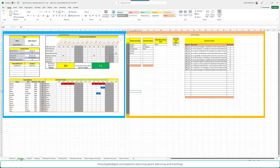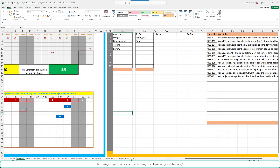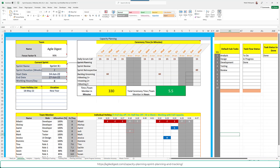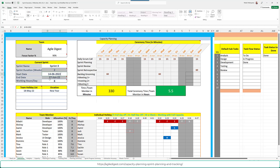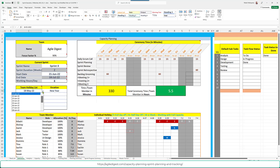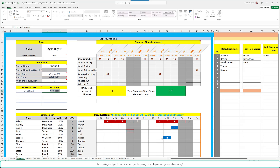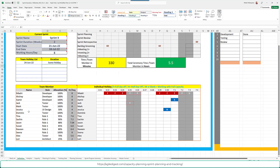We'll start with the Definition tab, which is inherited from a previous capacity planning template. First, we plan our capacity for a two-week sprint — we define the sprint name and focus factor. For the start date, let's say 21st. We can also define holidays; for example, the 24th of June is marked as a holiday with a reason noted for internal purposes.